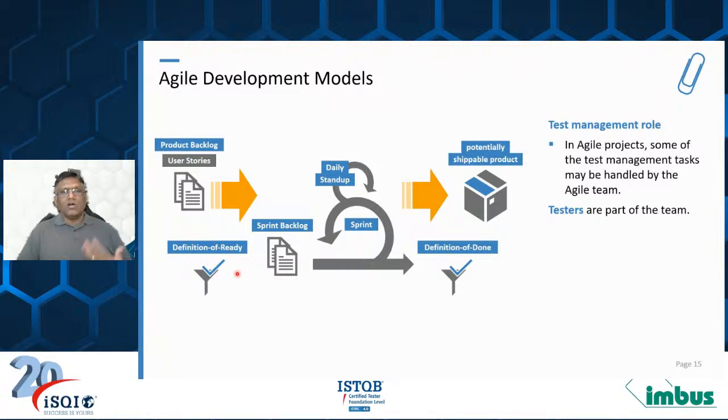As a team, as a whole team, we ensure that user stories are easy to read, testable, estimatable, right? You need to know how much to test and to what extent you want to test, right? Once you as a team agree that the user stories have all the relevant information necessary, for example, we call them acceptance criteria, then we prioritize them based on the sprints. Sprints are nothing but a weekly cycle or bi-weekly cycle, depending on your organizations. We prioritize them based on the business values.